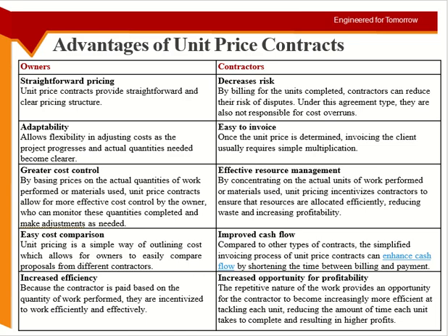Okay. But what are you doing in the unit price? You are giving the same. Okay. So actually your cost is decreasing, or your efficiency is increasing. Okay, so maybe you will spend less time. Maybe it's the same amount of labor and equipment, but because you are doing it repetitively, the excavation on the first day is not the same as the excavation on the third day. Maybe you will do more. Okay, so in the end you may save some cost here. You may reduce wastage because you already know what wastes your time and resources, and you can get rid of it.